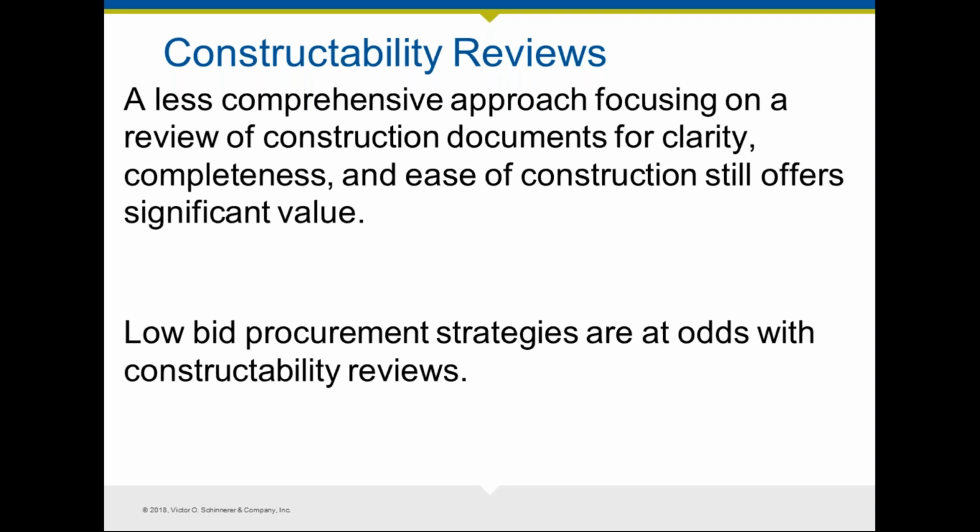Obviously, if you're in an environment where the whole notion of your construction documents is going out for the lowest bidder or the lowest responsible bidder, this is at odds with constructability review. So if you're in that type of environment, this may not be a practical element of your planning process.